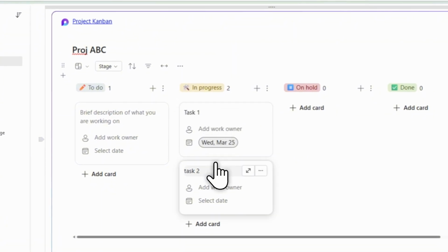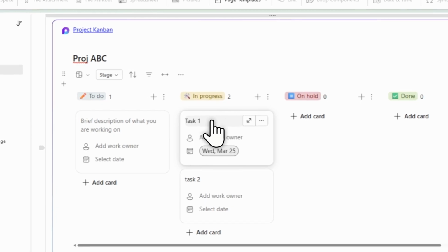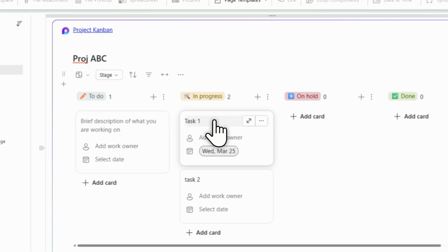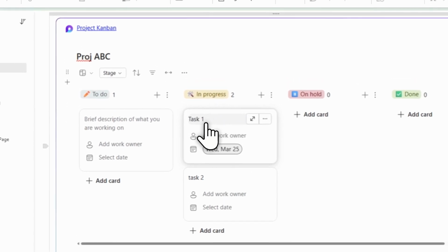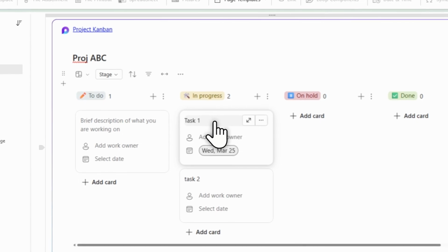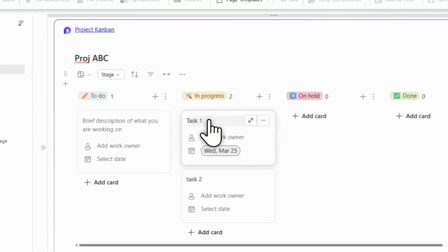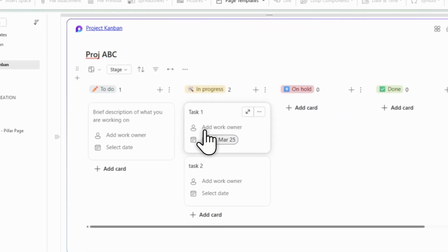And then every one of your team members will go through. Of course, in here, you can add in the duration or how much time you need to complete this task. Preferably, the task should be able to complete within a day. If it's more than a day, then you break it down into more subtasks so that you can track.